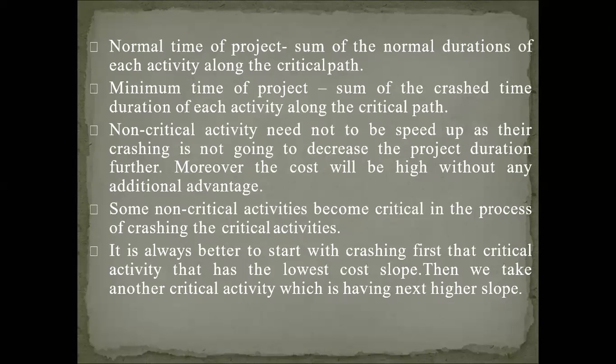As we are crashing the project, the critical path may become one or more critical paths. Sometimes two critical paths may be observed, and if two critical paths are there, we have to go for crashing of both the critical paths. That particular part may cause some confusion, because you have to crash both the critical paths for further steps.